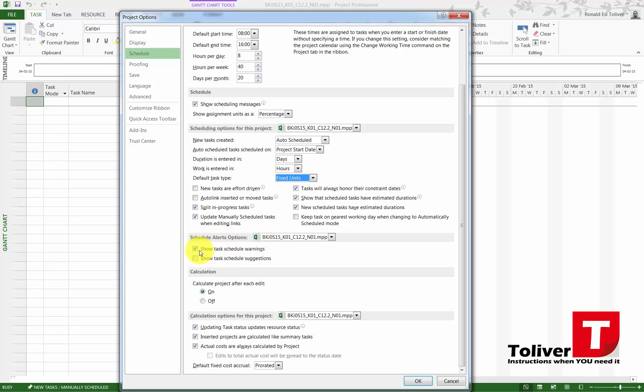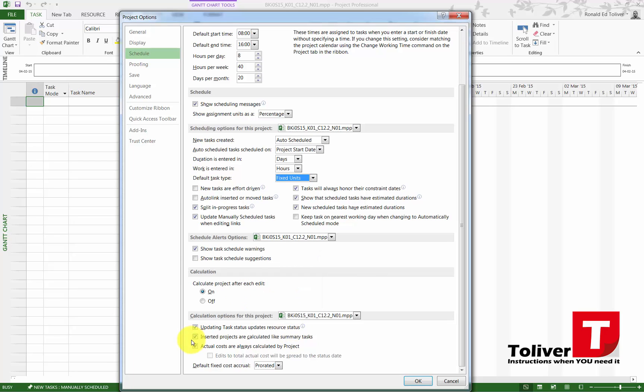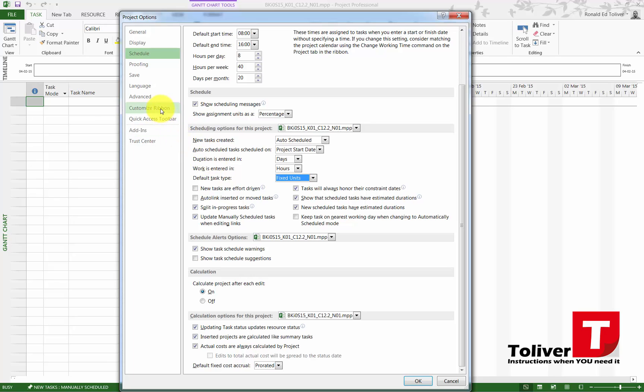Under schedule options, I like to show task schedule warnings. I want it to calculate the project after each edit. I want it to update task status updates resource. Inserted projects are calculated like summary tasks. Actual cost is always calculated by project.